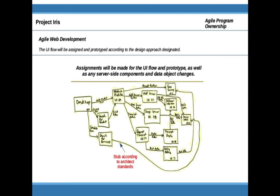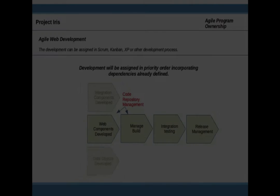They'll also determine if there are any components required on the server side, and if there are any changes to the data model that might require having the legacy team or the architects participate. It's very likely that the architect will pass to them information that some of their UI components will need to have stubbed responses, because the development on the services they'll be addressing may not be complete. It's only with the interaction between the technical architect, the business architect, and the UI team that the user interface will accomplish its purpose.